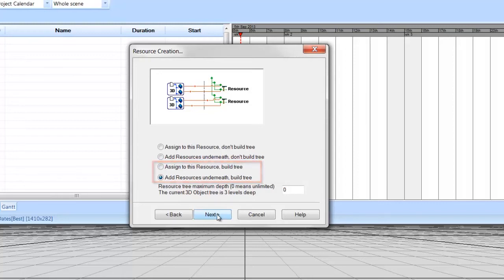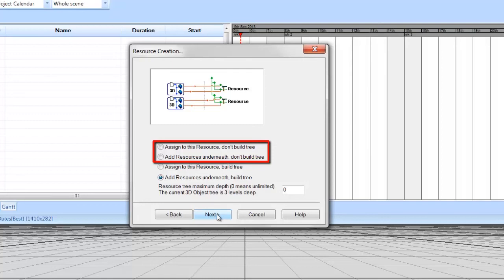Use the Don't Build Tree options to group all the objects within a CAD file as one. For example, an equipment model with all its subparts, wheels, bolts, etc., that does not need to be assembled in the animation, but will instead be assigned to tasks as a whole.